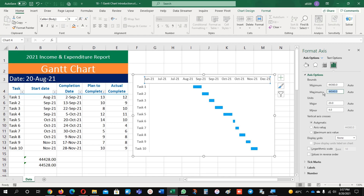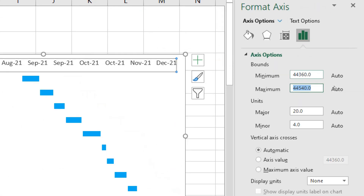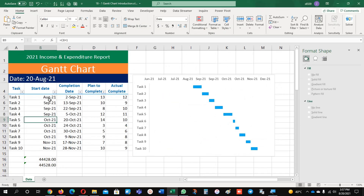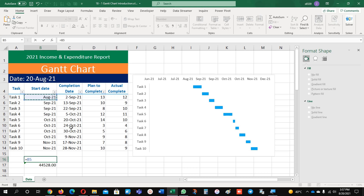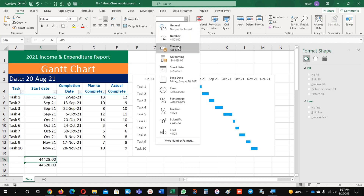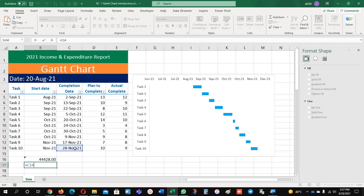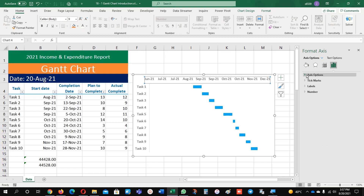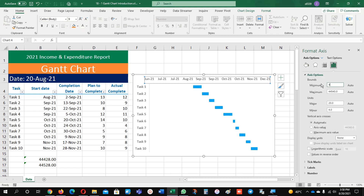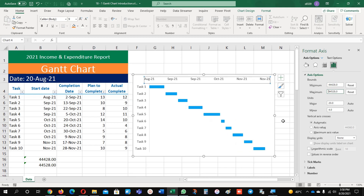You can see here there are some numbers on the axis. What are these numbers? As I mentioned in a previous video, every date is stored as a number in Excel. So what I did is I selected my start date cell and changed the format to number — it gives me the number. I also noted the last completion date as a number. Now I go into the chart X axis settings and feed in those numbers: the minimum is 44428 and the maximum is 44528. Now you can see the dates are reflecting as per our requirement.